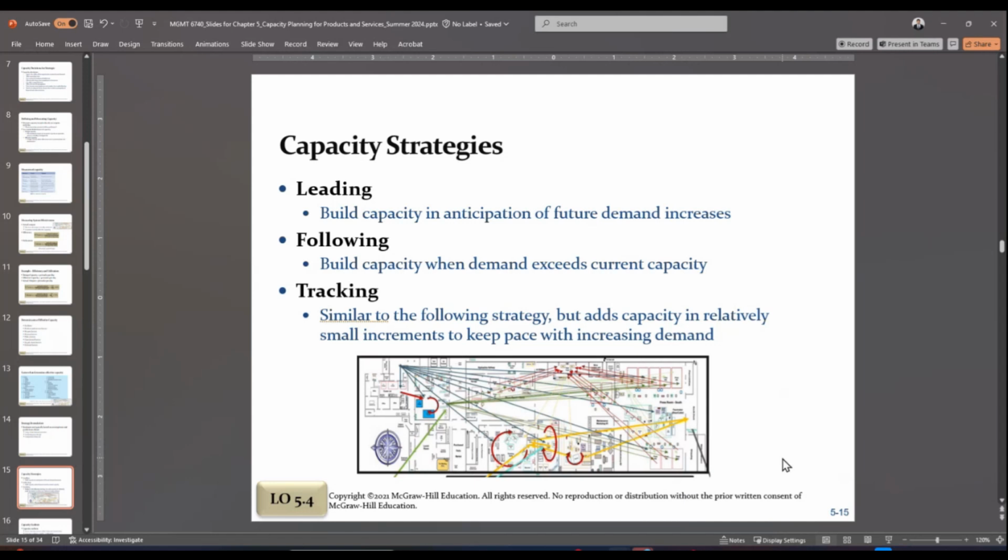Sometimes with the bigger systems, the vendor company you are buying from sees a 9 month lead time themselves. So you have to start way early. Other is some of the smaller grinders, benchtop type of grinders and so on. Some of those machines are readily available, and some have within like 2 to 3 months lead time. So in that case, you have to literally plan the whole system.